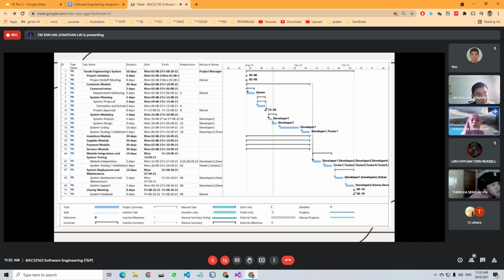So later when you do the costing, you need to adjust your cost based on the budget from the client. But now we don't have any budget, right? So we use whatever resources that we have. Like you said just now, you are following the standard pay rate. So it is still accepted. But during the real job later, you need to adjust your cost based on the client budget.